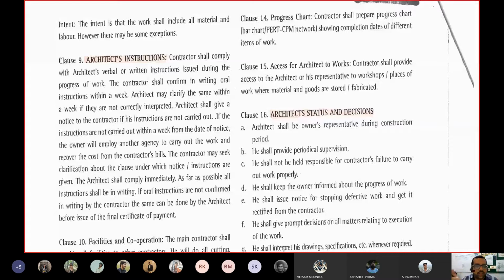Immediately the contractor will prepare the necessary modifications in the third drawing or the second copy of the original drawing, make the necessary changes in the contract documents, and take a copy of that. That means an amendment to a particular section of the contract upon the architect's instruction is made on this particular date, and it will be sent to the architect for his approval within a week.